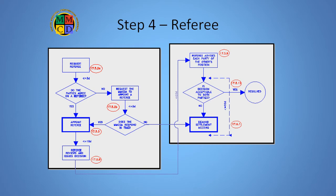If the negotiators will not meet or fail to reach a settlement, then the next step is to appoint a referee. A referee is any person the two parties agree can provide a new, impartial, and useful opinion. Most times, the two parties exchange names and pick a person acceptable to both sides. If this fails, they can apply to the MMCD Association and we'll see if one of our certified referees is available. If we cannot provide one, then the referee's step can be bypassed so as not to delay the dispute resolution process.